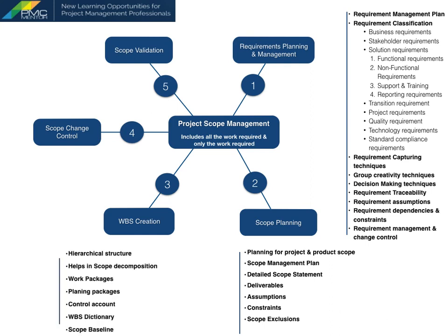Next concept is designing and creating a work breakdown structure. WBS is a hierarchical decomposition of total project work. It decomposes the project work into small deliverables which are converted into work packages. Work package is the lowest level in a work breakdown structure, and builds the foundation of a project schedule. In WBS, planning package is a level above the work package, yet to be decomposed to work packages.